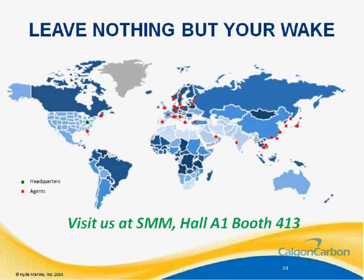What are the pitfalls you can encounter in EX installations? So explosion-proof installations are a unique animal. There are many different things that need to be addressed with that. I think the key in any EX environment, and we have a number of different EX solutions, including some LPG tankers, some oil tankers, and some other chemical tankers and such, is to address the issues with the class society and the owners as part of a hazard ID analysis, and make sure that during the hazard analysis you consider all of the different potential issues and problems that may come in. At that point, it's very critical that the operators are familiar both with the EX requirements and the system requirements.